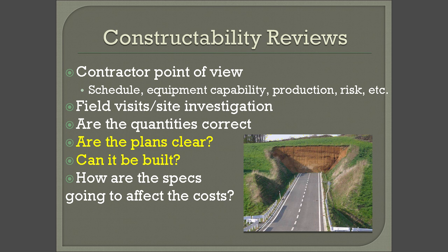You design the project and it looks good. I'll give you an example. It was a two-way road. The designer designed it to excavate one side, do a full reconstruction, and use the excavation material in an embankment. That's very normal. But if you cannot put it in the embankment because the traffic is right there, what's going to happen? The project completely changed. The contractor bid the job, excavated, and stood there and said, what do you want me to do with this material?